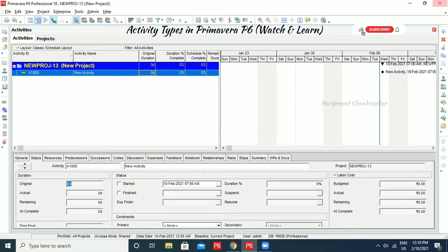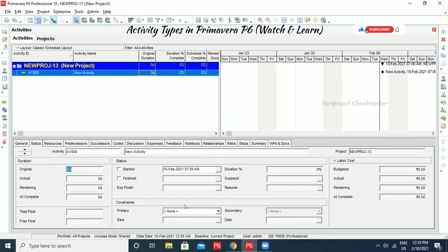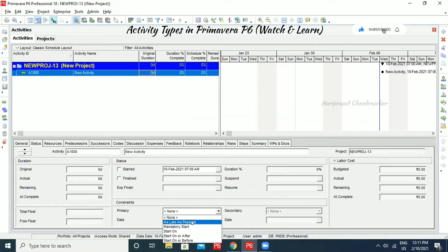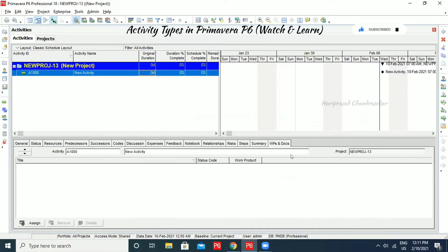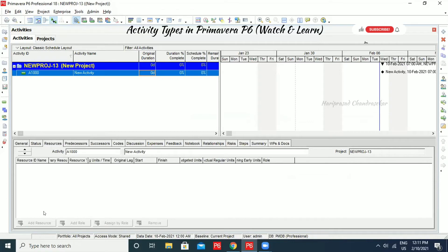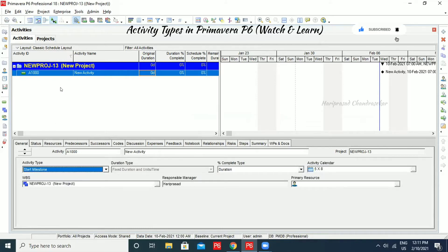We can assign constraints to this Start Milestone activity. We can also assign work products and documents. But one thing we can't do in Resources — we can't add any resources because it is not an activity at all. It's just an indication. The same is applicable for Finish Milestone.